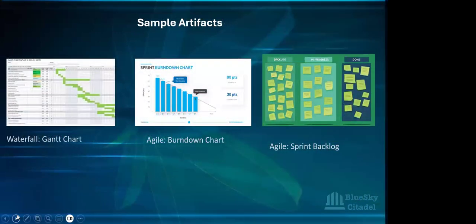And then here are some other ones. I do apologize, these images may not be great, but another one in terms of planning and even the execution phase of waterfall is your Gantt chart. So you would have set out all the different tasks that are going to be completed within this project, and then you will be updating your planned time against the actual time.